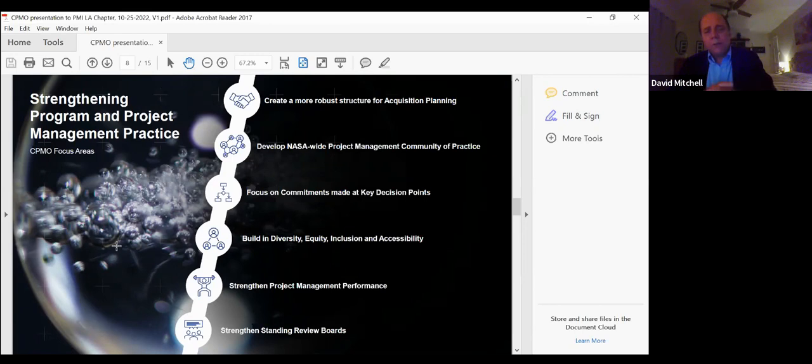I mentioned the fifth one, and the last one is the whole side of what we do with independent reviews, to make sure we're not, I'll just say, drinking our own bathwater. We have independent experts come in and look at how the performance is, and they report out separately from the project to agency leadership to say how we're doing on the road to getting to launch.